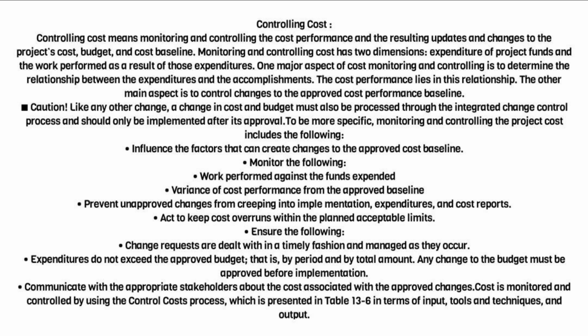Ensure the following. Change requests are dealt with in a timely fashion and managed as they occur. Expenditures do not exceed the approved budget, that is, by period and by total amount. Any change to the budget must be approved before implementation. Communicate with the appropriate stakeholders about the cost associated with the approved changes.